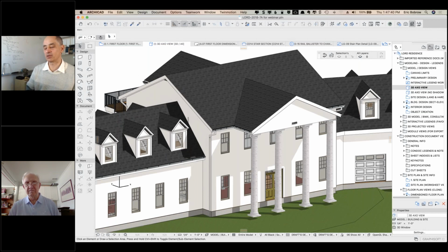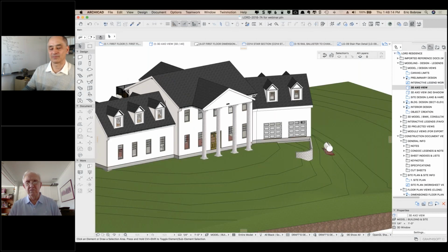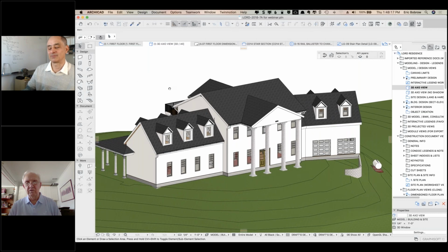And it's a fire rebuild, right? It is a fire replacement, yes it is. And so it's an interesting house for a couple. One of the things that you said you were very pleased about was that you were able to take the initial measurements from the person who had started working on the project but was pushed aside, or you took over from, and you were able to put the model together within about 4 or 5 days or something? I actually went back and rechecked my timing for that. So yes, I put in less than 40 hours to put the project back in a model form, and ultimately did the entire project through the county in 199 man hours. So it's pretty much of a budget for sure.